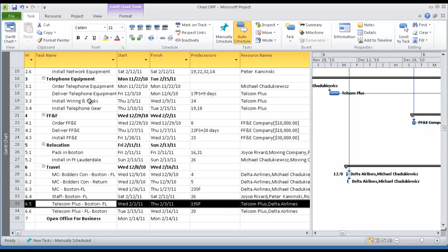I prefer to throw a forward pass. In other words, I begin with a start date, then add finish-to-start dependencies and lags, working my way to the end of the project. However, if the completion date does not meet my overall project objective, I manually adjust my end date and throw a backward pass, working backward through my dependencies until I reach my objective. I sometimes have to throw several passes in both directions.